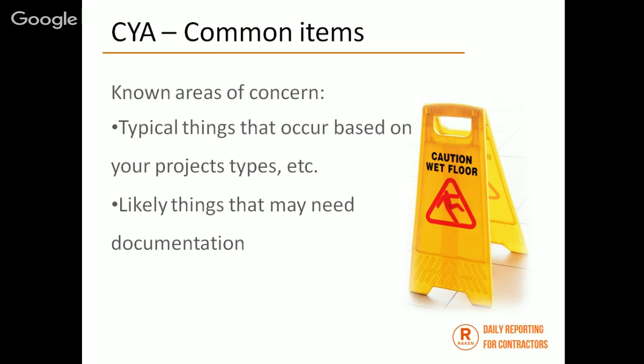And my important story of why this is important deals with people that do traffic control. We used to do a lot of that in road work. And what we would require is that at the end of the day, we would always take a ride and video the traffic control, because you never know when an accident occurs. And the first thing that's going to happen is the lawyers are going to get involved, and they're going to start trying to claim that you did not set up your traffic control properly.